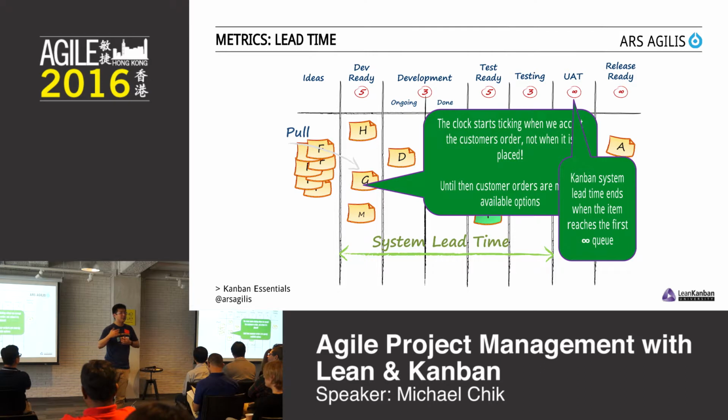But if the ops team is under your direct control, and maybe even part of your team, you could put a limit on it very easily. So system lead time is how long does it take for one ticket to go from one end to the other, which basically means how fast can you develop. There are a couple of factors in there. As long as your ticket size is not random, and by random I mean mathematically random, this works.